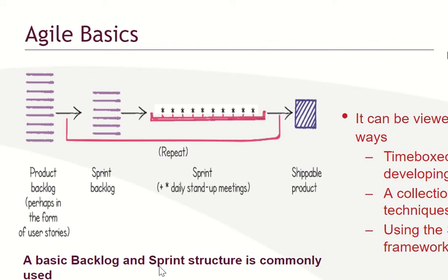I don't want just anybody to have access to the land. So the first thing we do is a fence and put a gate there. That's the sprint. After I have done the gates, then I want to do the foundation. That is another sprint. After the foundation, I want to put blocks up to the lintel or roof level. That's another sprint. Okay?